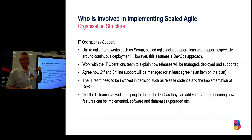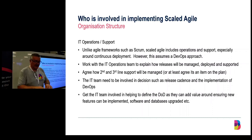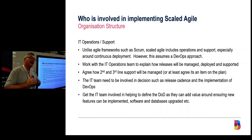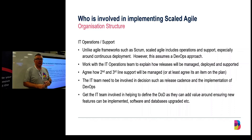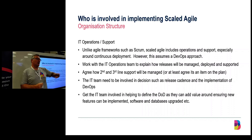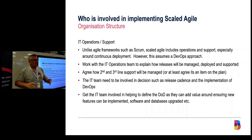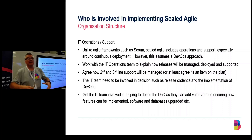The IT guys are very valuable people. I find it useful to sit down with them when you're doing your definition of done. Suddenly they come up with different things from the developers and BAs — they want to know it can be installed, what happens on upgrade, whether database changes matter, they might want run books. Get them involved in the definition of done because it means teams are developing software that the IT team are happy to accept and deploy.